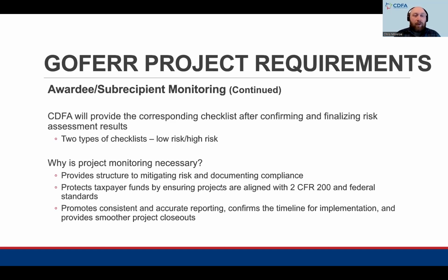So here we have the awardee and subrecipient monitoring continued. CDFA will provide the corresponding checklist after confirming and finalizing the risk assessment results. There are 2 types of checklist, low risk and high risk. As I mentioned, CDFA will go through the risk assessment process for each organization and municipality. We'll determine if the level of risk we have identified is low or high, and then we'll coordinate with you and send the corresponding checklist.